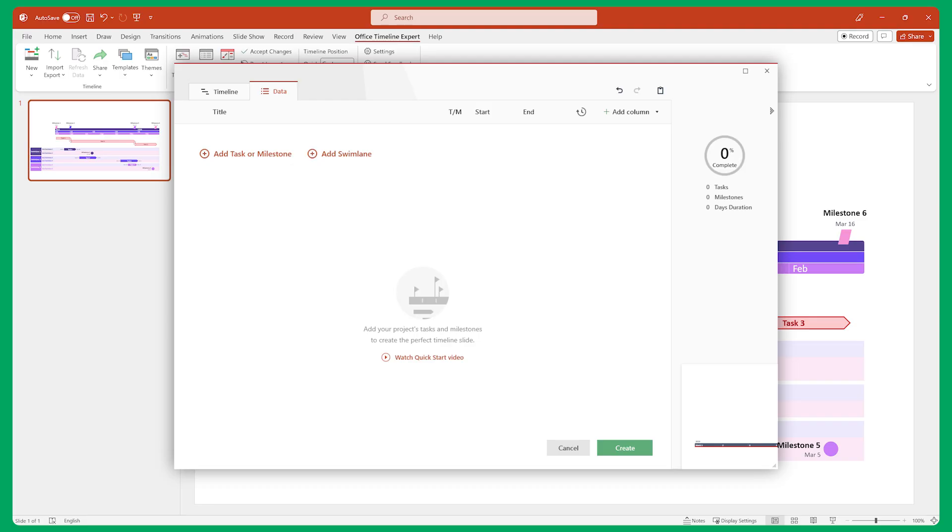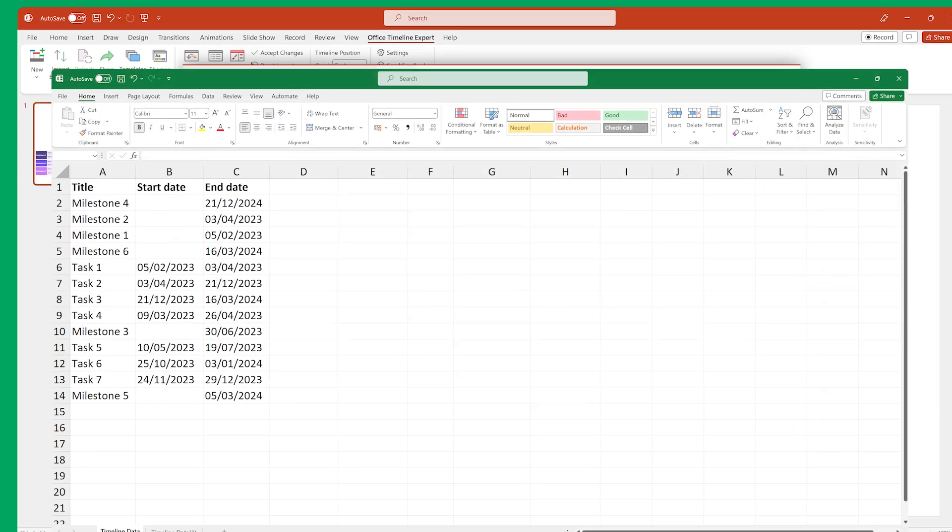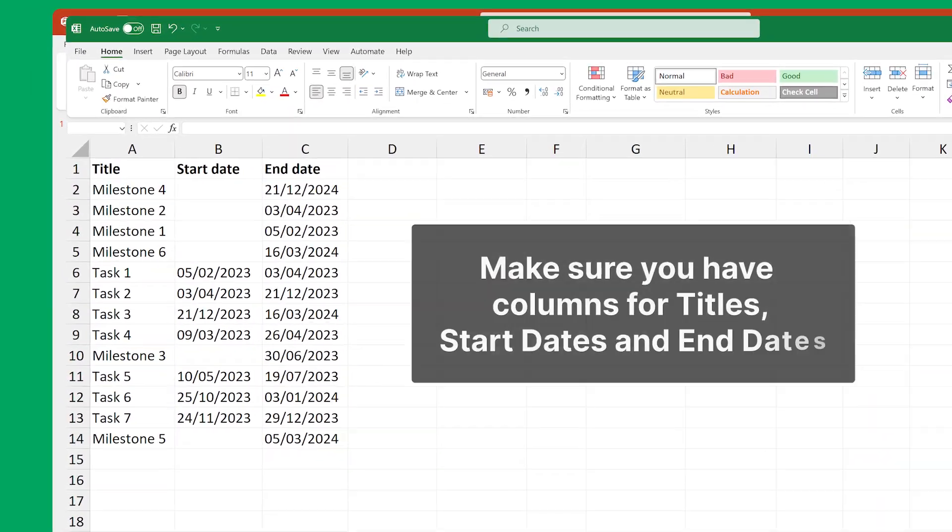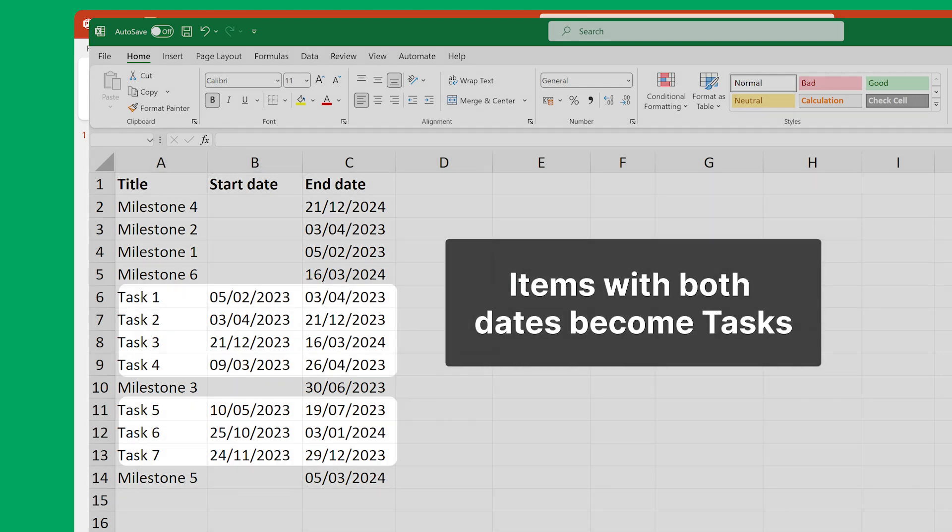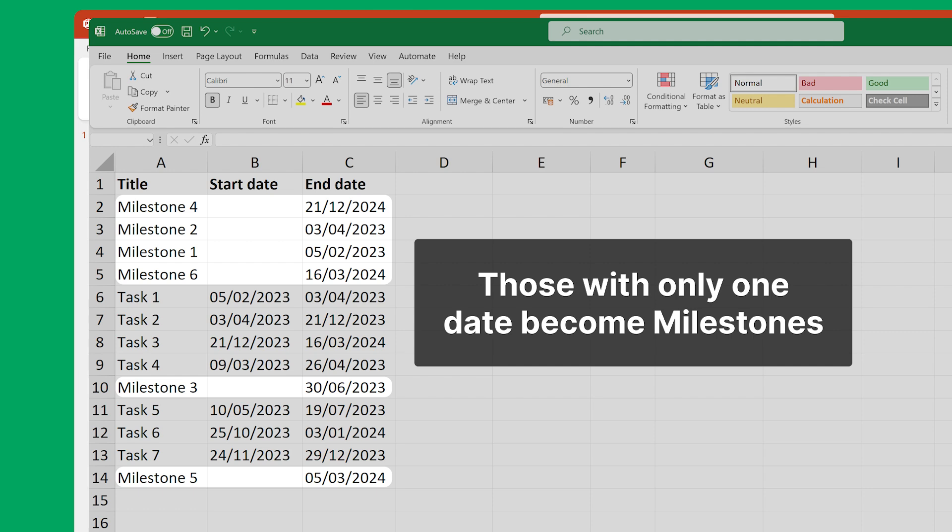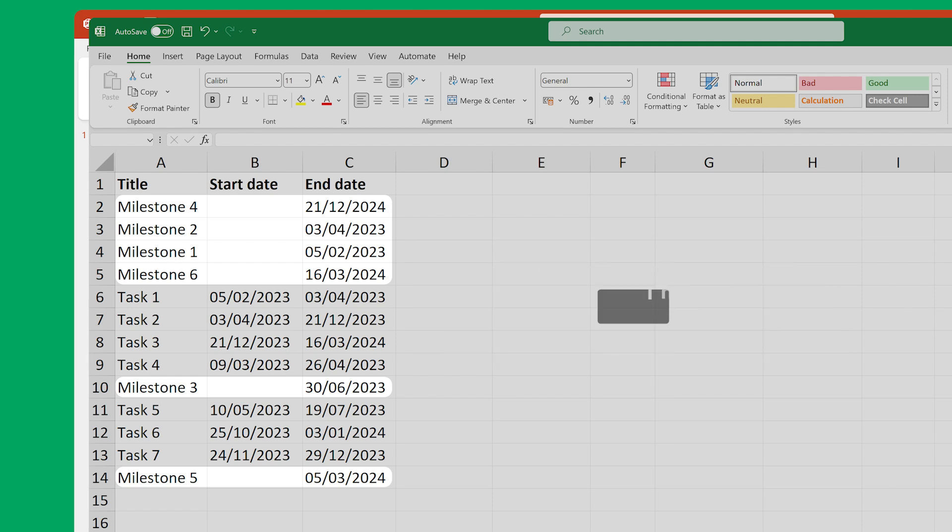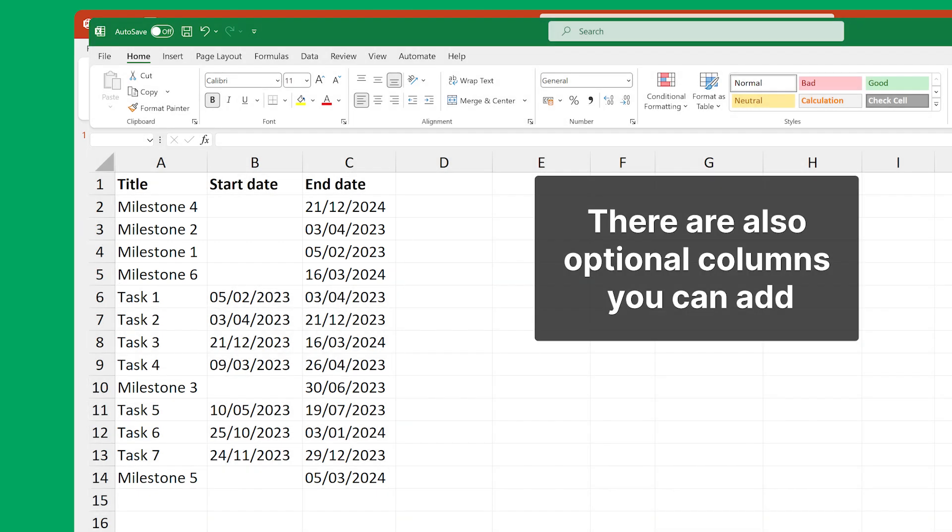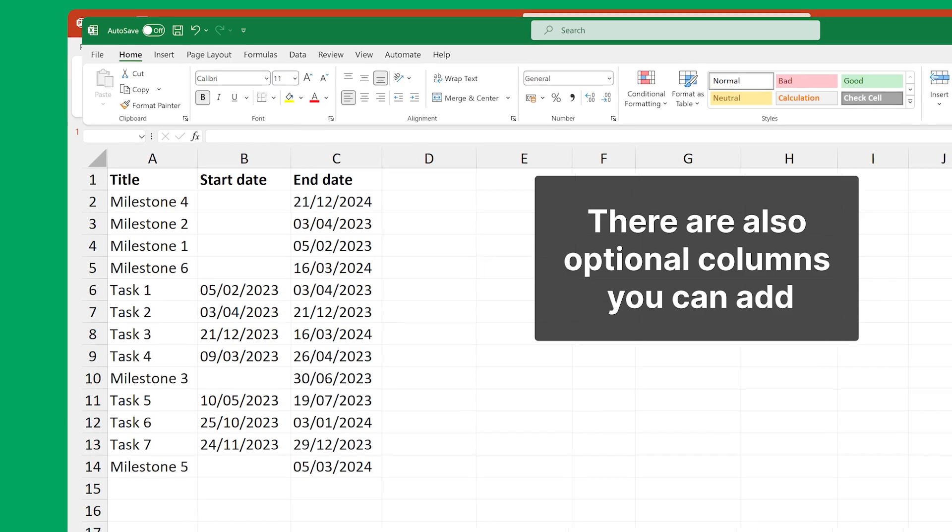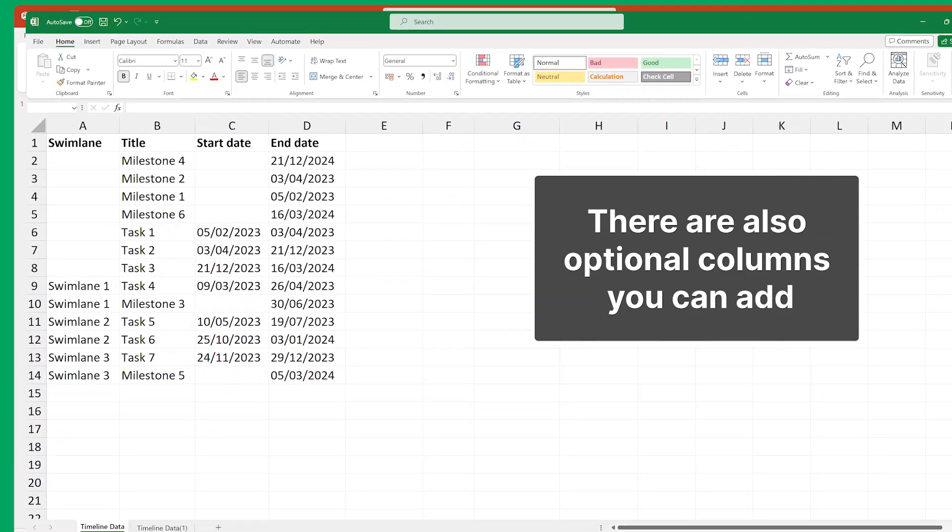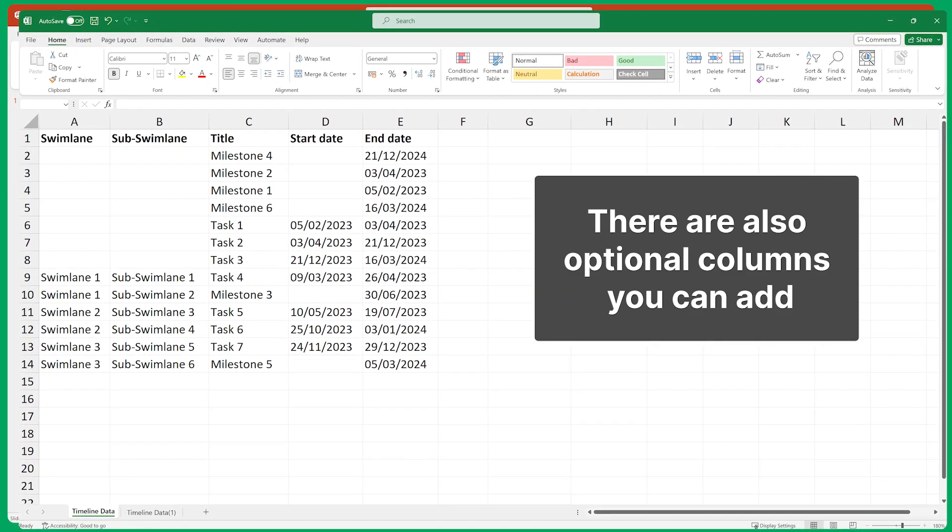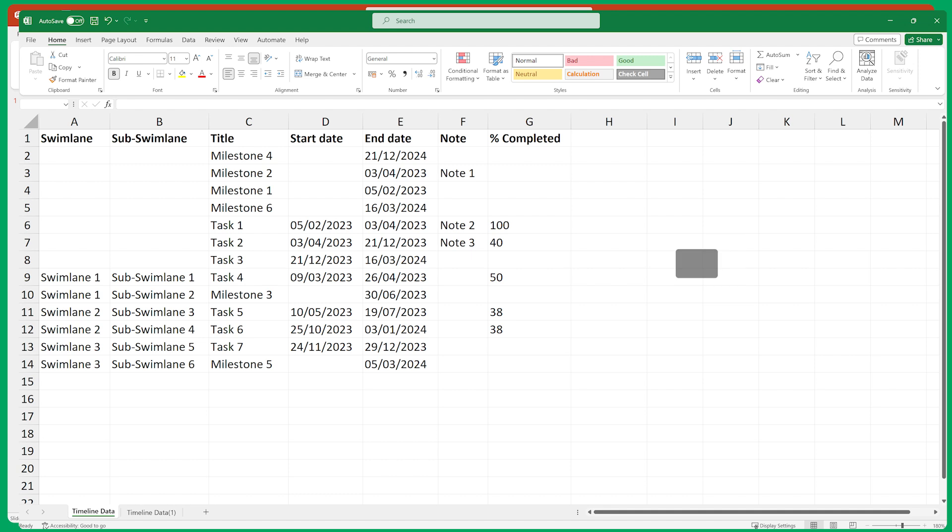All you have to do is to make sure that your Excel sheet has columns for titles, start dates, and end dates. Items with both dates filled in will become tasks, while those with only one date filled in will become milestones. And there are also optional columns you can add, such as Swim Lanes, Sub Swim Lanes, Notes, and Percentage Complete.